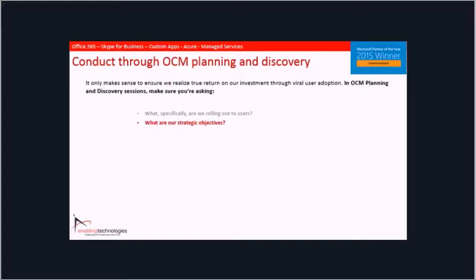Ask yourself as well, what are your strategic objectives, right? Because change management is more than just happy users. It's about shaping user behavior in a positive way to support strategic objectives. I'll give you an example. If dial-in conferencing is one of our strategic return on investment objectives for the Skype for Business deployment, we need to incorporate that early and often into our OCM strategy to make sure that we're properly training and educating the users on those expectations. That's when we'll truly see that return on investment.